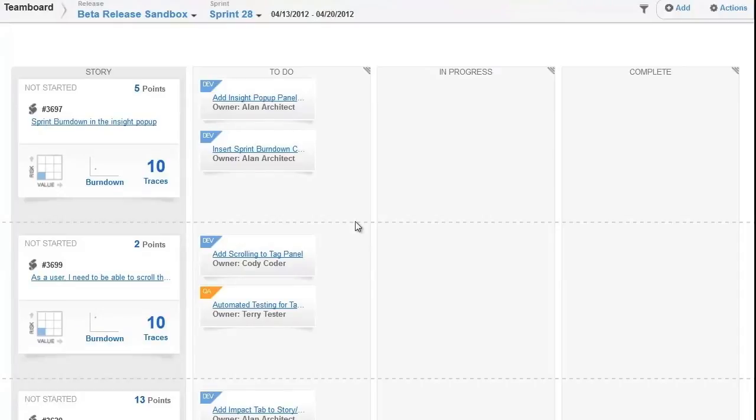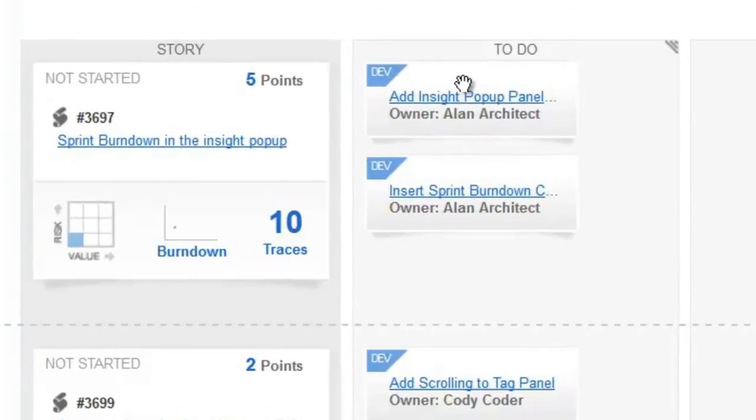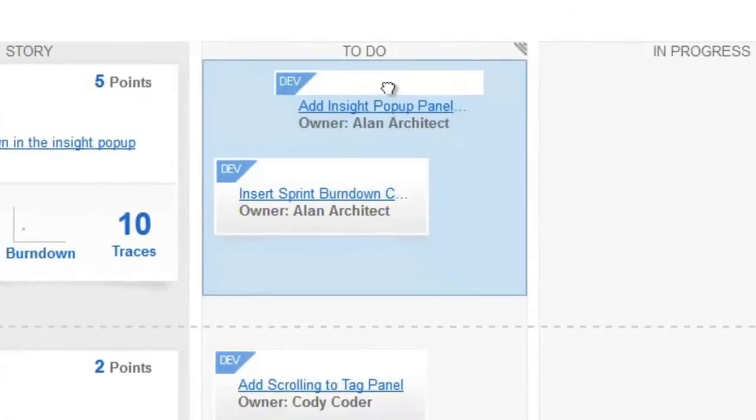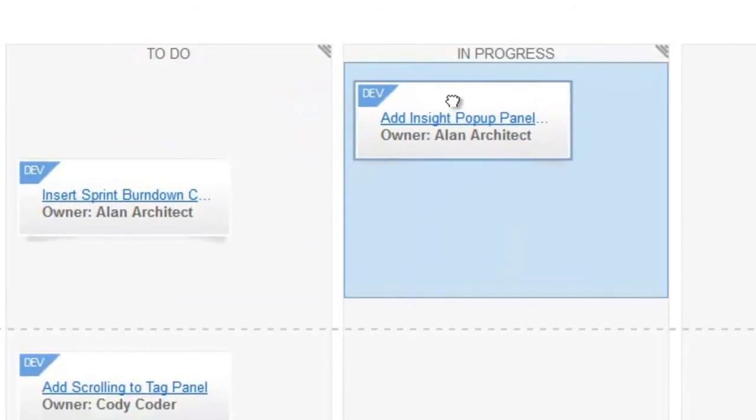During stand-up, team members can update task status simply by moving the task card to the appropriate column on the team board.